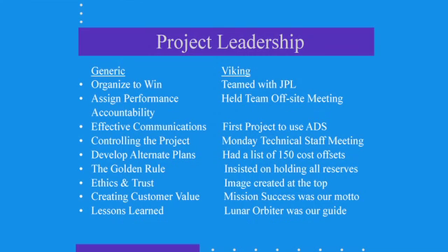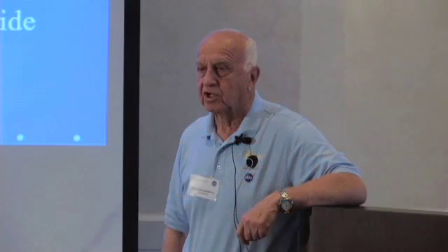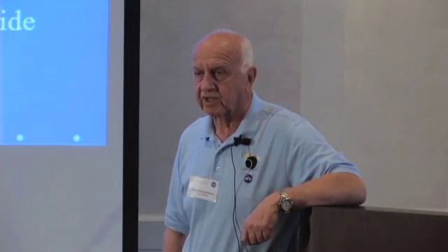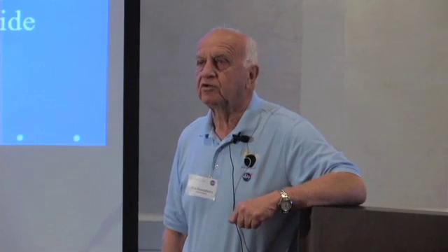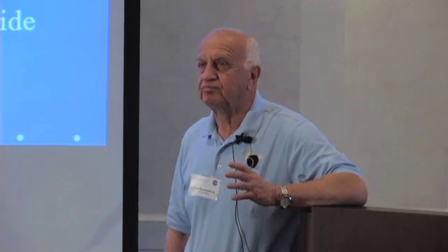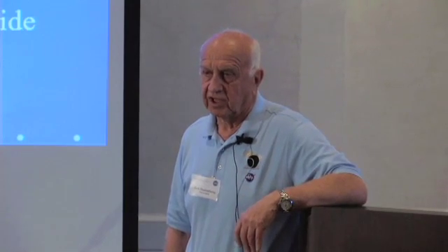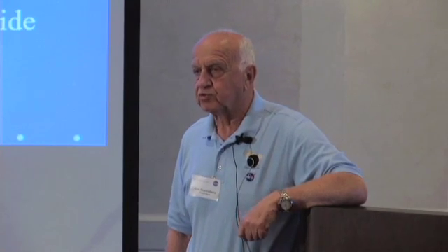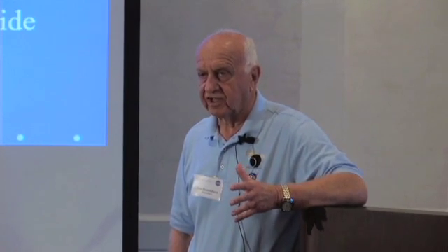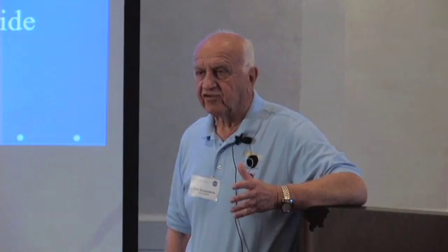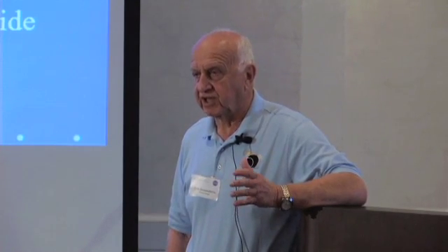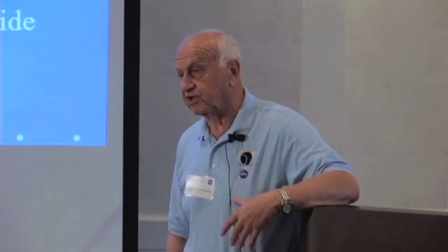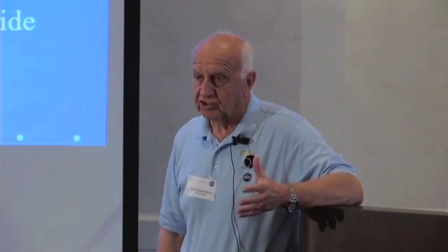We had Monday technical. We never had a business, an organizational staff meeting in 8 years on Viking. All our meetings were intended to control the project. And the emphasis was on, it was Black Monday every week, because you were only allowed to talk in the meeting if you had a problem. Because we were problem oriented and problem solved. And he invited everybody that controlled resources to be in on the meeting. Now, we didn't have teleconferencing, we didn't have video, we did it by charts on the wall.